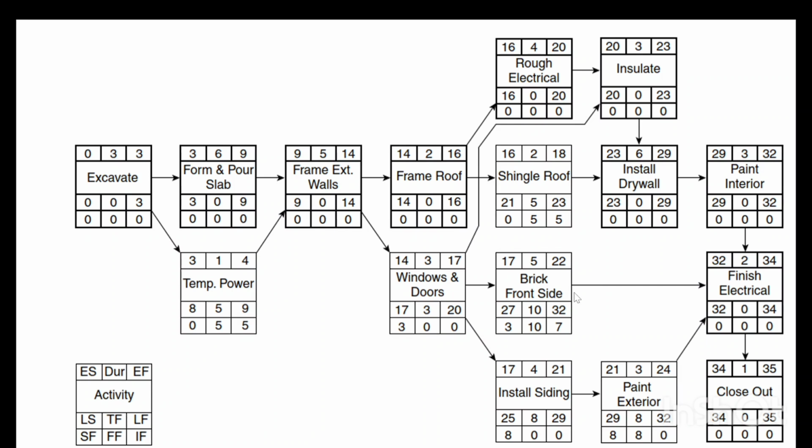So to recall again, we have here 10 and here 7. We take the 7, which is the independent float. We have an independent float of 7 days, which you can see here in the legend, and we have 3 days of shared float, which you can see here. How do we spot this on Primavera P6?